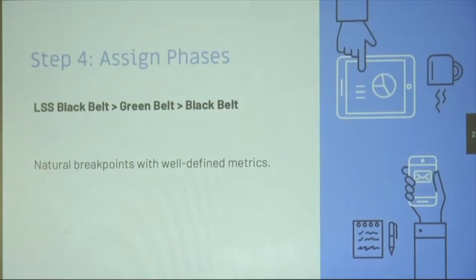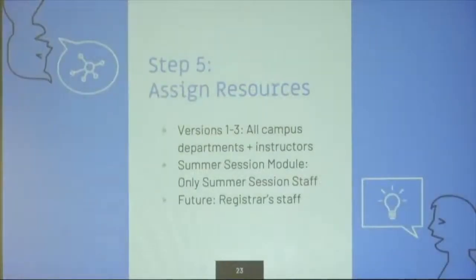Next slide. So we had those natural breakpoints with well-defined metrics. We knew what was supposed to happen at those handoff points, and we knew who was supposed to provide what to whom, so we could measure that. It was a really good way of gauging the overall impact of the project. And through that, we were able to split up the resources so that it made sense with those chunks.